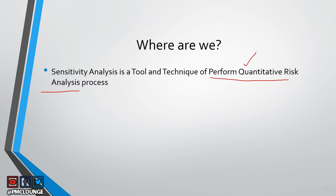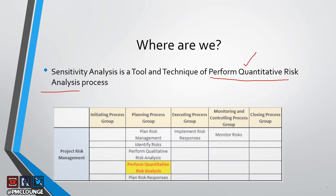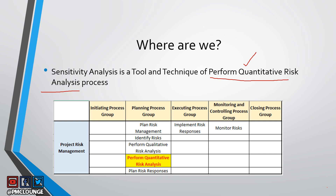Here is the PGKA, or process group knowledge area mapping. The knowledge area we are talking about is Project Risk Management. The process group is the Planning Process Group, and the process in question right now is Perform Quantitative Risk Analysis. Sensitivity analysis is a tool and technique under this process.